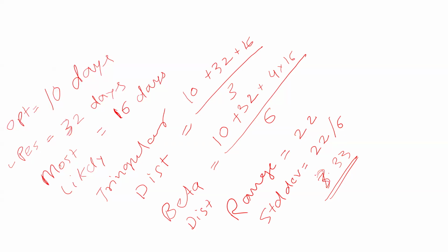So, coming back to that, Swati, what is the importance? It says that lower the standard deviation, this process is very established. Remember, if your team is again and again doing the same thing, standard deviation will reduce. Why? Because the difference between optimist and pessimist will start reducing. Because you are doing it day in and day out, the difference will start reducing. Range will reduce. Range divided by 6 will reduce.